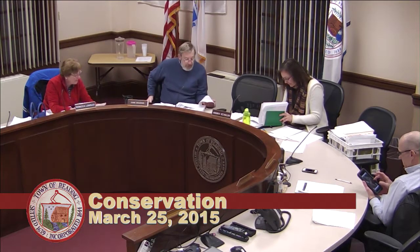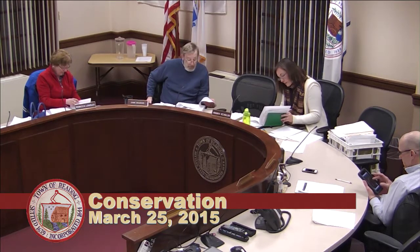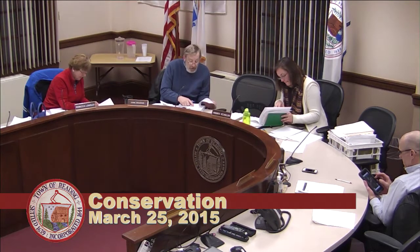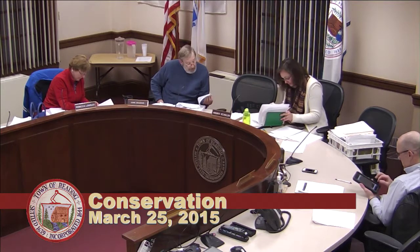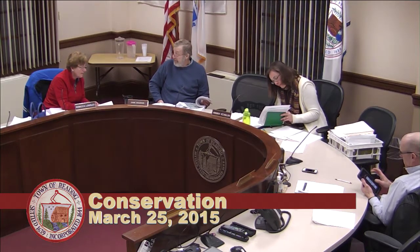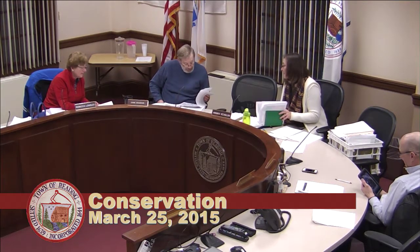Well, this gives the AECOM project manager right here. There are so many people working on this project at so many different levels. If you're interested, just call or email this person. Lori Farron. And it has her email and phone number right here. She's the project manager, and they're preparing an ER, which will then become an EIS. So you could get on the mailing list, and you could specifically ask to be included in the scoping process for the EIS.